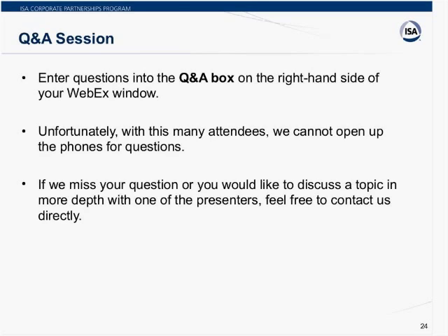And I think Cheryl, you had a second question that was related to total cost of ownership. So I'll hit that one as well as I talk about this. Generally in the FEL2 stage, we would recommend doing both the TIC and TCO. So if you were comparing brand X and Y, you would do an estimate for the upfront cost of the new system, or, say, comparing two new systems. But you would also look at the TCO.